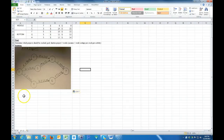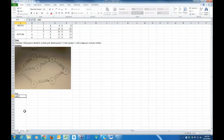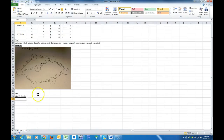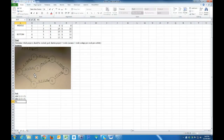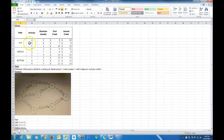The next thing we want to do before using the template is identify the paths. We have path ABC, which is nodes 1, 2, 5, 7. The next path is A, E, C at nodes 1, 3, 5, 7. And finally the bottom path, F, G, H at nodes 1, 4, 6, 7. Activity C is shared by the top and the middle path.